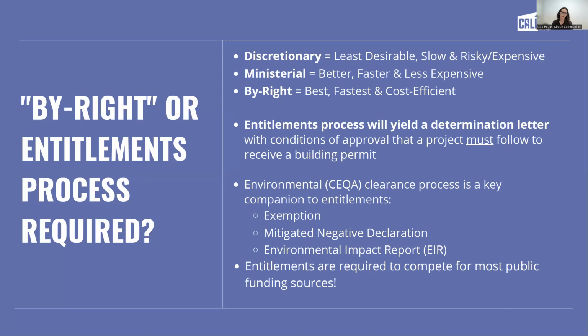So there may be requests made by community members or folks on the planning commission or city council, depending upon how this process works, that require you to make further changes to your initially conceptualized project. These kinds of processes can take quite some time, 12 months or more. I call them least desirable because of the risk and the time, as well as the expense. They usually require the most amount of reports and design and engineering. There's back and forth.